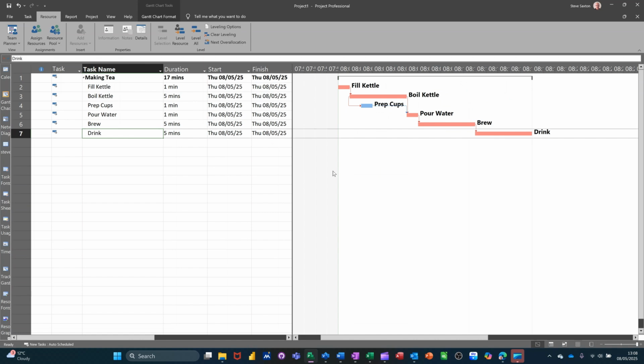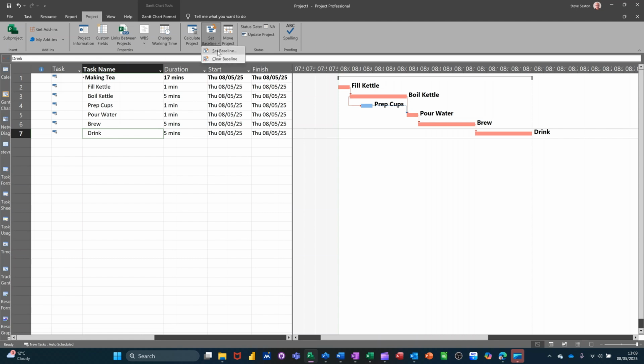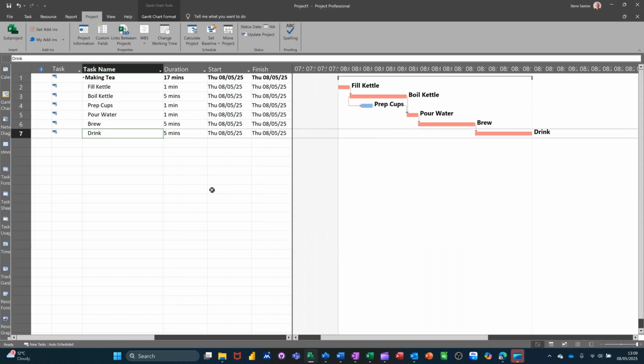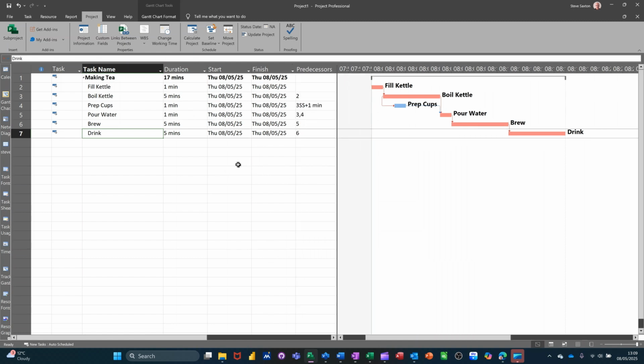Now what you would do is you would save this as a baseline. So if I go to the project tab and set baseline, that's like a snapshot in time. Okay, and now you can track this project and see how it goes. So first thing I'm going to do is say we're going to have to reduce the brew time because we've only got 15 minute tea breaks. If I put that to 3 min, that gives us 15 minutes.